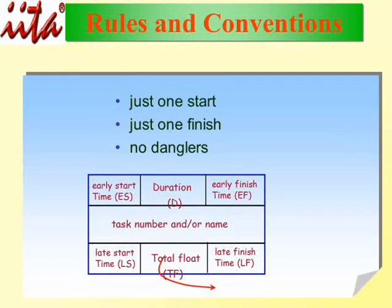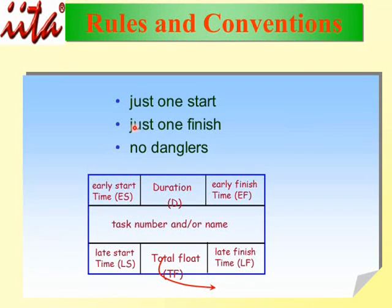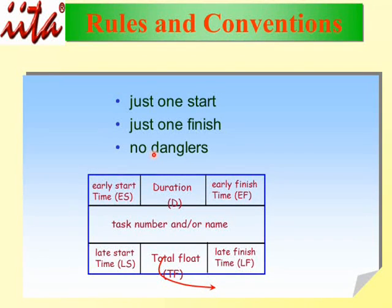We have a convention with rules to follow. There are only three rules: just one start is allowed, just one finish is allowed, and there are no danglers — no bridge leading to nowhere.